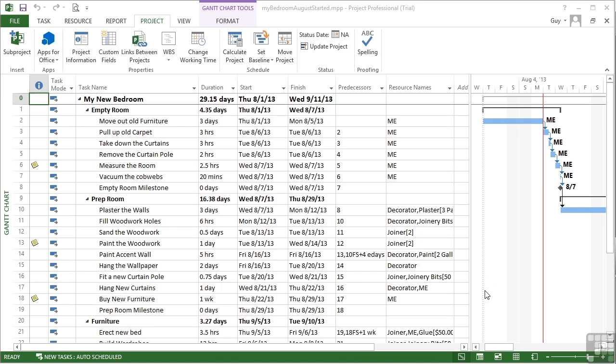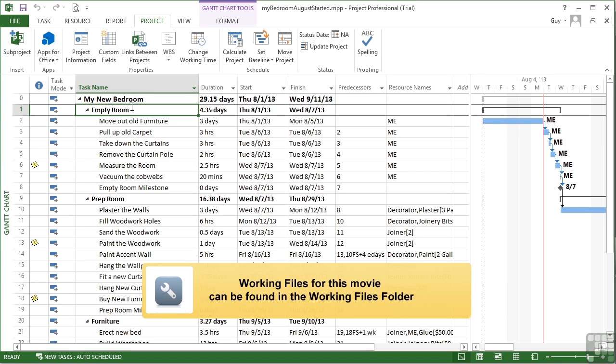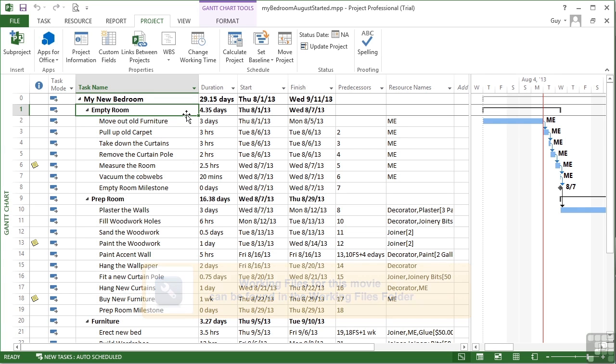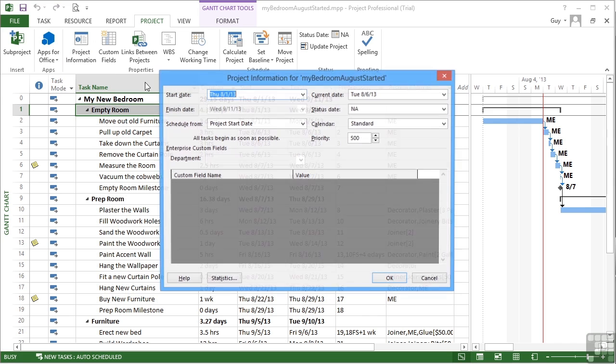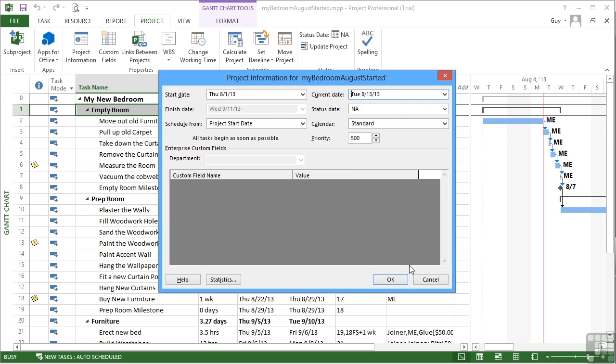Let's take our file MyBedroomAugust and look at how we can update multiple tasks in one go. First, let's move today, so project information. I'm going to assume that today is the 13th of August.